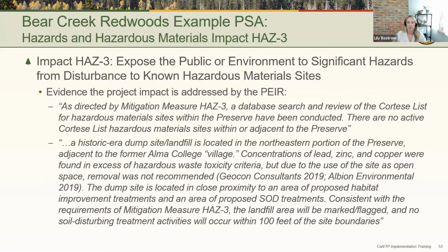However, a historic era landfill was known to MidPen to be located in close proximity to some of the treatment areas, and concentrations of certain pollutants have been found in excess of hazardous waste toxicity criteria. So consistent with the requirements of Mitigation Measure Haz 3, the landfill area would be marked or flagged, and no soil disturbing treatment activities would occur within 100 feet of the site boundaries.